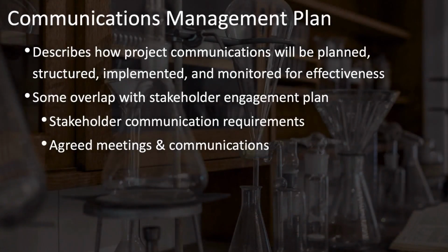And now we come to the communications management documents, starting with the Communications Management Plan. This management plan describes how project communications will be planned, structured, implemented, and monitored for effectiveness. These lessons are combined together into one because there is a significant degree of overlap with the Stakeholder Engagement Plan. The stakeholder communication requirements and agreed meetings and communications are some examples. Communications management is especially important because it's estimated that the project manager should spend as much as 90% of the time on communication.